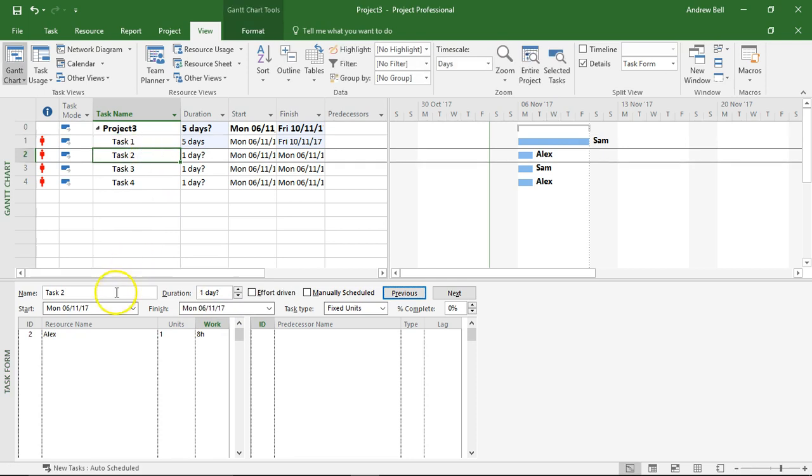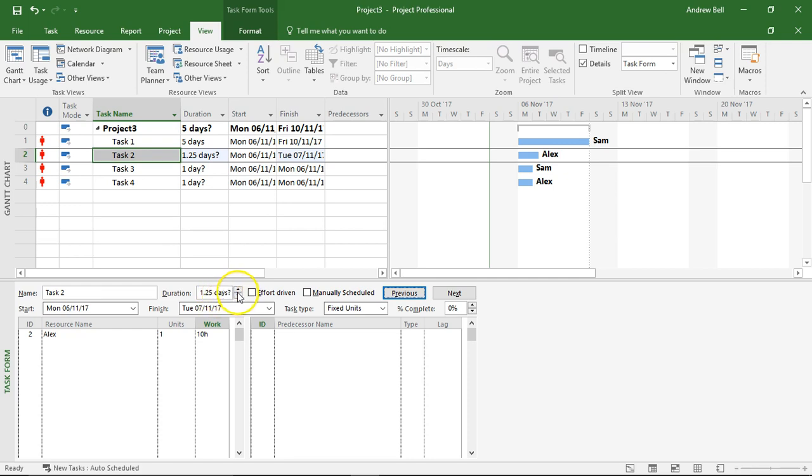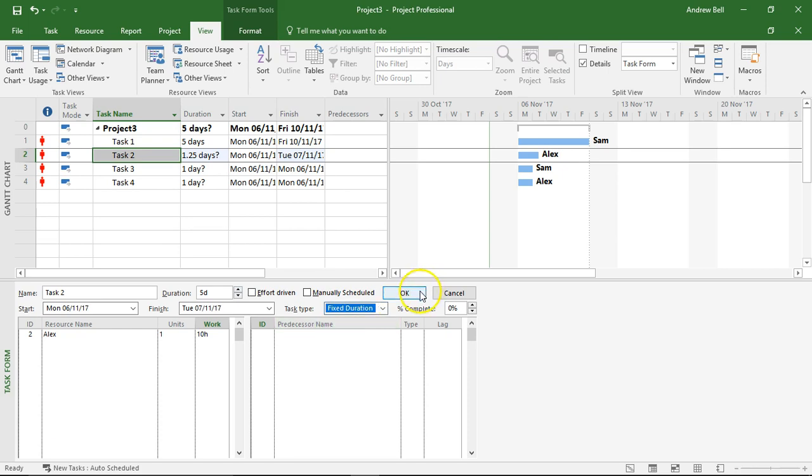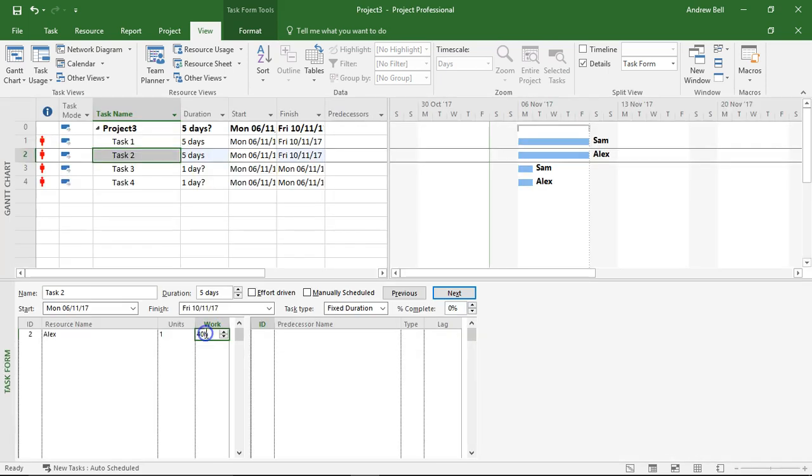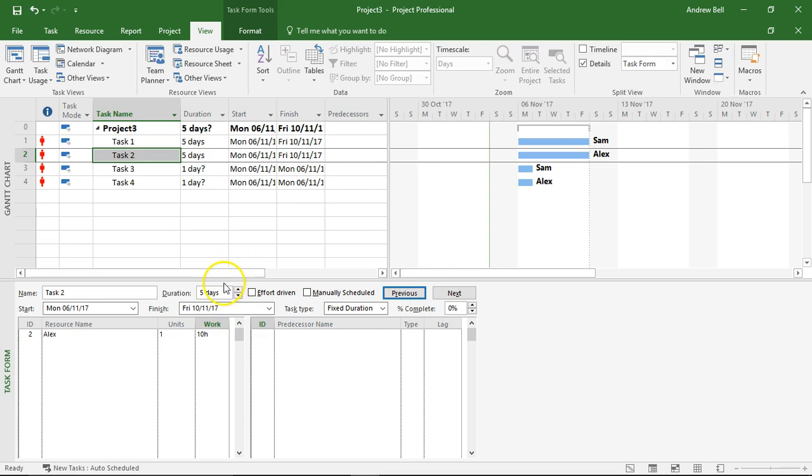Task 2 Alex is working on it. I'm going to set this to be 10 hours of work initially. The computer says that's one and a bit days but I'm going to make it five days. I'm going to fix the work, fix the duration at five days as well. The computer's changed my work so I need to put that back to 10 hours of work. So 10 hours over five days Alex should be doing two hours a day on that. We'll check that in a minute.